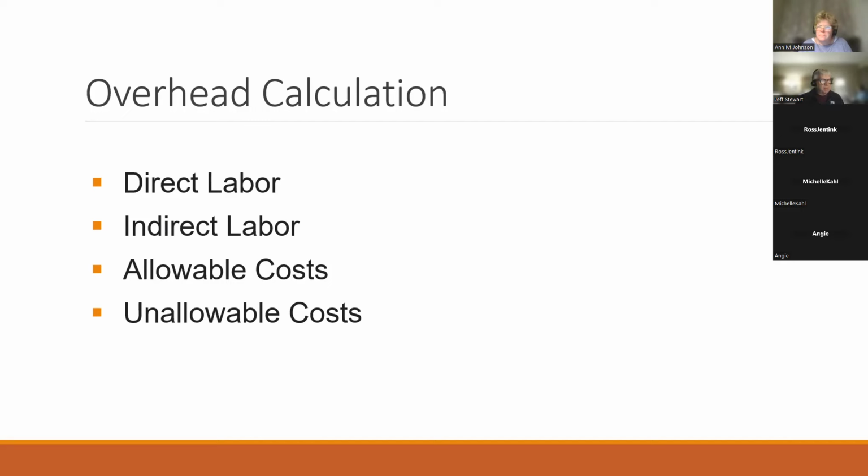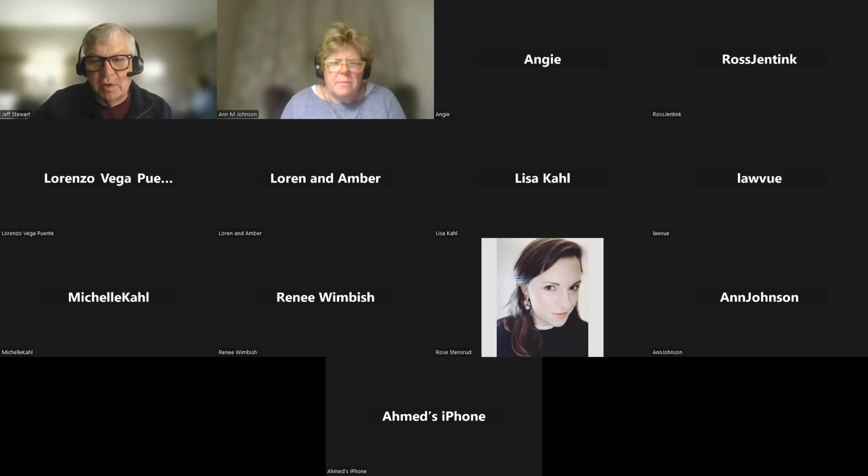So as I mentioned, on page 16 of the questionnaire, it talks about all the unallowable costs. So we kind of went through that pretty detailed already. So those are the actual computations. And the actual computation, and I guess I didn't summarize that in a formula, if you will, is your indirect labor divided by your direct labor, or your allowable costs. Pull that spreadsheet up again, and it has the calculation right in it.